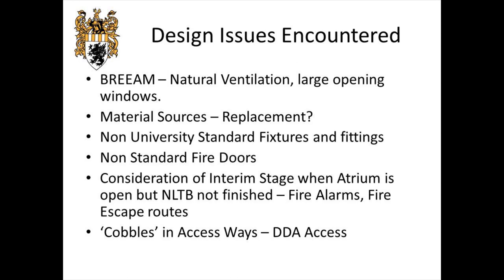Non-standard fire doors are another issue. If you walk along the bottom corridor in Abercrombie you'll find the fire doors are quite heavy to open because they're taller than normal. The design team can't actually establish exactly why they're heavier than they should be, but they do suit the building aesthetically. In terms of health and safety they don't yet meet part of the building regs, but we'll keep going until they do. We're now at the stage where some are installed, and for the NLTB we've got time to simply change the spec, but for the 18 or 20 already installed we've got to do something about them.